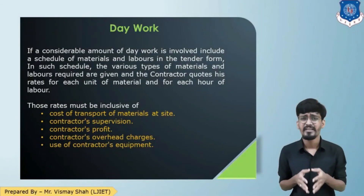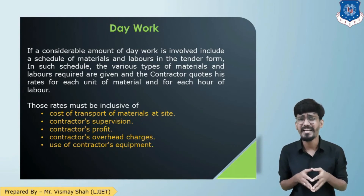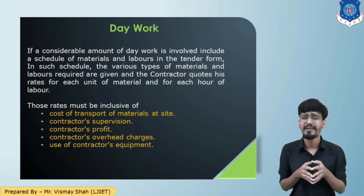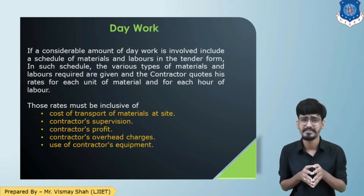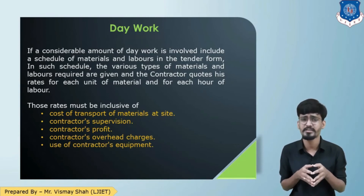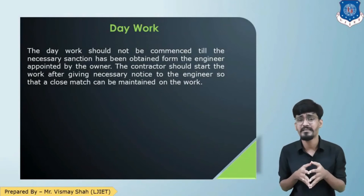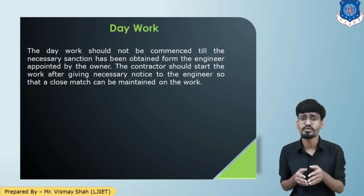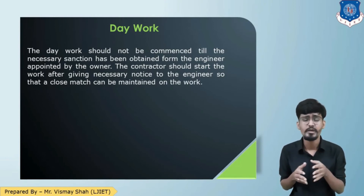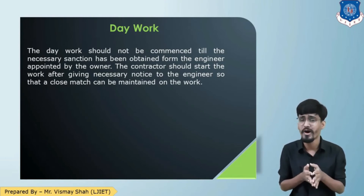If a considerable amount of day work is included in the contract, the client will provide details of various materials and labors required, and the contractor has to quote rates for those materials and labors. Those rates should be inclusive of cost of transportation of material, contractor supervision charges, contractor's profit, contractor's overhead charges, and use of the contractor's own equipment. Day work cannot be commenced until the contractor gets approval from the client or client's engineer. The contractor has to inform the engineer in charge by formal notice that he is going to execute this work as day work, so that it can be closely monitored.